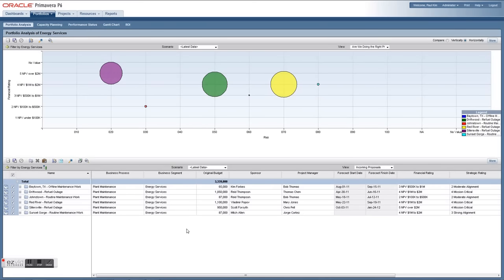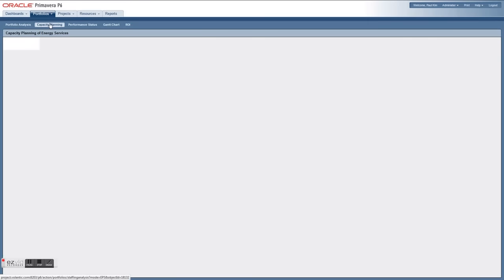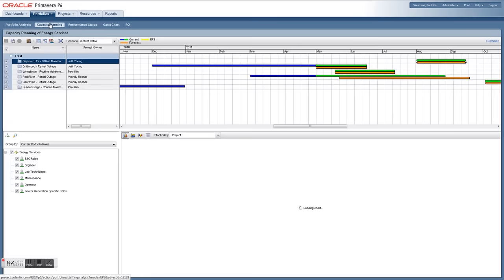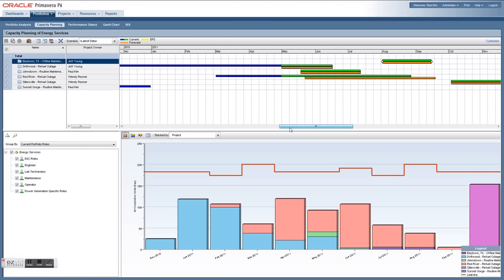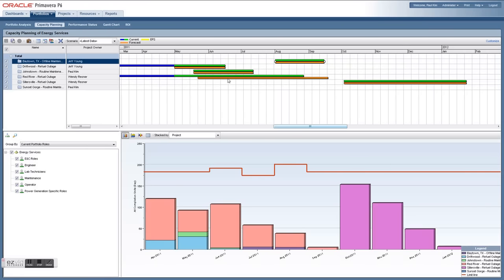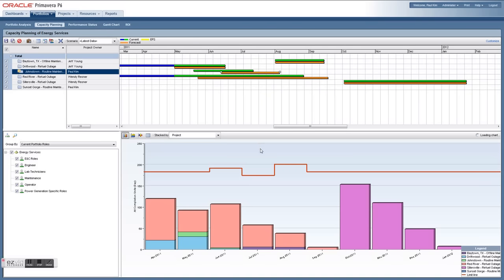In addition to portfolio analysis, you're able to look at capacity planning needs — how many people and what roles are needed to fill these projects. Oracle Primavera P6 allows you to forecast capacity needs for potential projects and do what-if planning by moving start and end dates, running filters by different user types, and picking the right strategic mix of projects to move forward with.